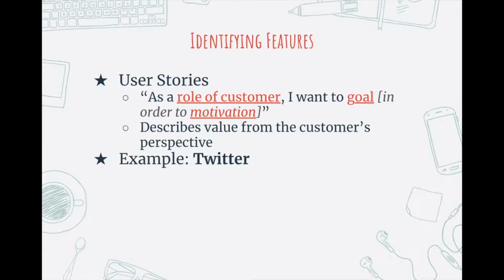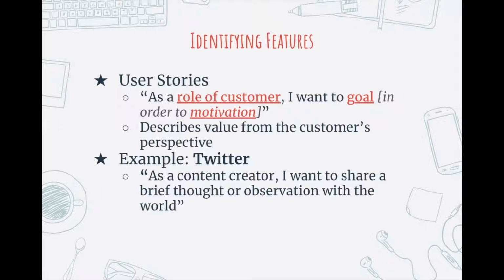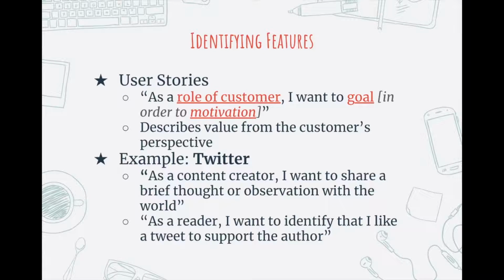And so this really keeps the customer as the focal point of development. So for example, if we were developing Twitter from scratch, you might write a user story that says, as a content creator, I want to share a brief thought or observation with the world. Or, as a reader of that content, I want to identify that I like a tweet so that the author gets that feedback or gets that support.